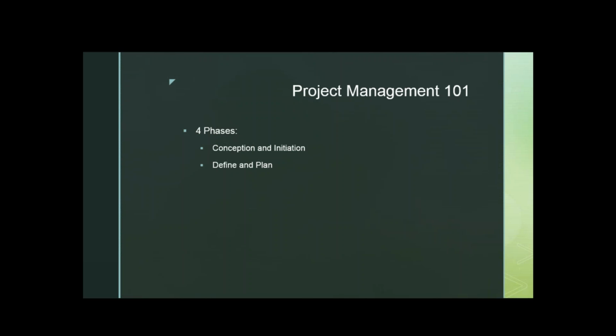You also want to come up with a communication plan at this point so that you know who needs to know what and how often you're going to be communicating with everybody, or the manager will be communicating with everyone, because communication is a big factor that you want to keep in mind so that everybody knows what's going on. And we already talked about some timelines and milestones and sequencing. Sometimes there's some things that have to be done before other things can happen. So if you can see that ahead of time, that does help the project go a little more smoothly.